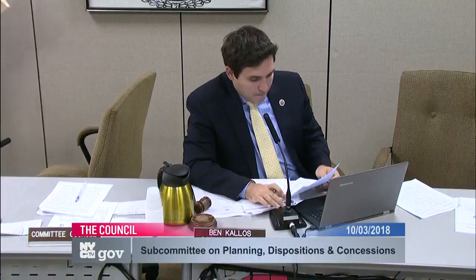So we got involved in early 2015, and we closed on the acquisition and the construction financing in early 2017. So 2 years is about a typical pre-development phase for a homeownership project. Some of the main challenges that we find in pre-development is securing the financing for the project, and especially in a deeply affordable project like this one. And when you got to it in 2015, it was already 65% complete? No, HPD still owned the land at that point. The building was only in its early stages of design. We were coming into the project almost from scratch. Okay, and so it's already 65% complete. How soon will it be done? Scheduled completion is February 2019.